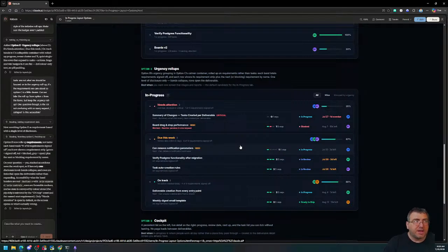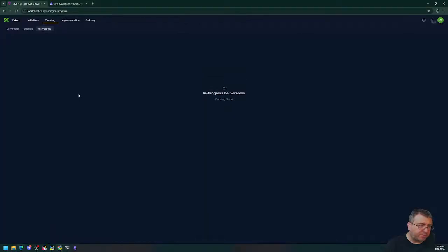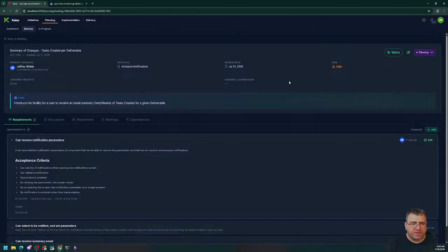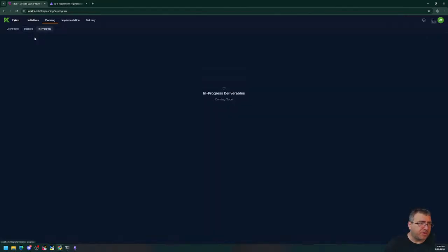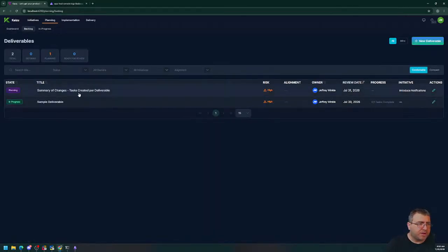Because I think the review date is not a deadline. The review date is when do I want to check in next. There are no actual deadlines involved in this piece at this point. Due date is something that I'm trying to avoid. However, I think a due date, an expected delivery date, is necessary to evaluate risk properly, right? Because review date is when do you want to check on it next. So we might have to add that in to do more there. So for right now, the in progress might just be a simpler view of that.